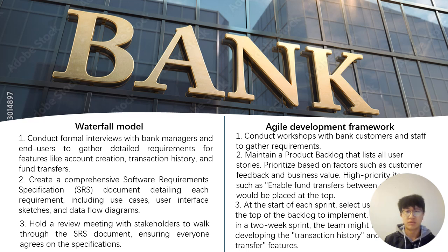This document serves as a formal agreement and a reference point throughout the whole development process. But Agile focuses on lightweight documentation, often relying on user stories and acceptance criteria. The documentation is less formal and more adaptive, emphasizing communication over exhaustive documentation.